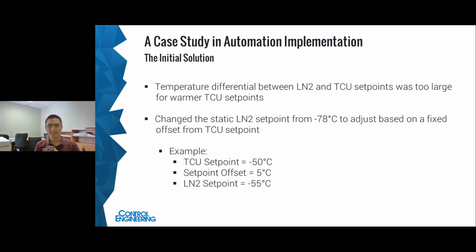So what we identified as the root cause for all this was simply that bypass valve was paired up with a piece of equipment that's really sensitive to low flow rates. But the problem was we were pretty much at the end of the project here. Things were almost all commissioned. And so the customer was coming to us and asking, how do we solve this problem using automation? How do we solve this problem without changing anything we've got in the actual process?